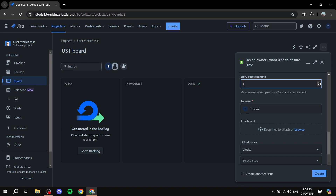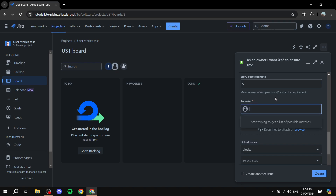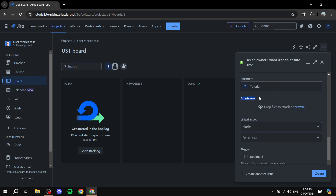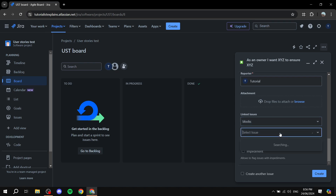Here we have the story estimate points — set this according to your needs; I'll keep it at five but change it accordingly. Add the reporter as well. For attachments, this can be left empty, but it depends on the story — if it involves inserting a logo, attach the logo; if it involves a specific video, attach that. You can also link to a different issue from here. Then click 'Create.'